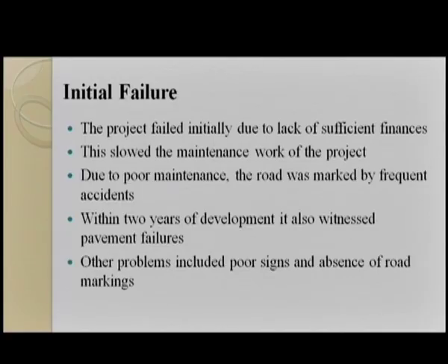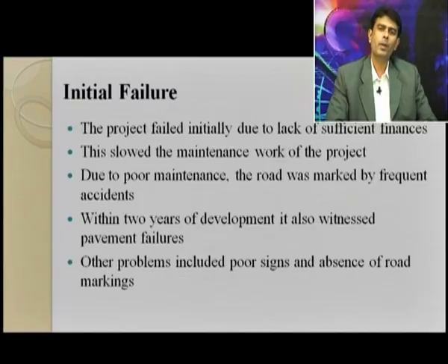Initial failure. The project failed initially due to lack of sufficient finances. This slowed the maintenance work of the project. Due to poor maintenance, the road was marked by frequent accidents. Within 2 years of development, pavement failures were witnessed. Other problems included poor signs and absence of road marking.